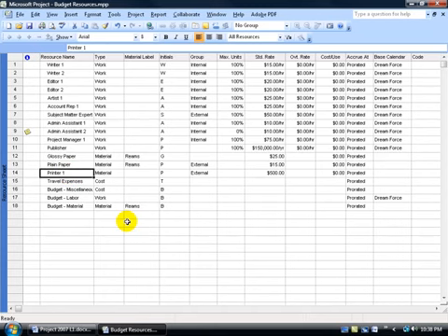Now you can do this one of two ways. If you want to keep track of all the materials, then I would go ahead and get rid of all the labels here. If you want to keep track of the reams but also the printer, and maybe you have other materials like pencils, pens, hammers, then you may want to go ahead and come down here and assign a budget for pencils, a budget for pens, and then say a group of pens, like 10 pens to a group, and so on. Just like we have reams for glossy paper, it's 400 sheets per ream. You'll have a little bit more to budget to keep an eye on if you add more budget materials, but if that works for you, go ahead. Otherwise, just go ahead and get rid of all the labels and just have them all under materials.